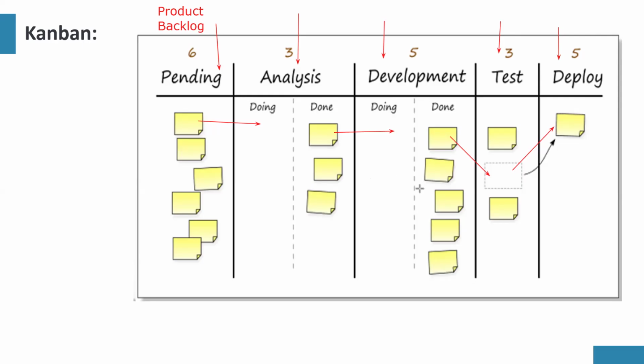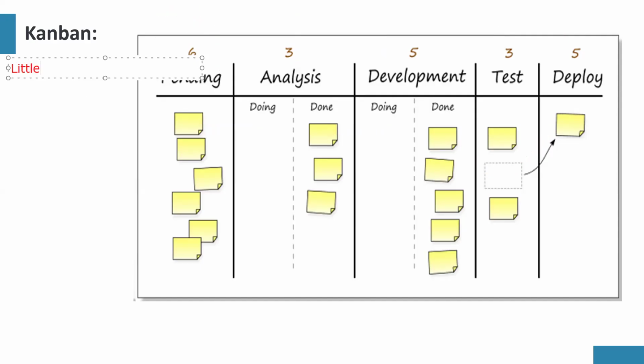One thing you need to know, which is important and very popular when it comes to Kanban questions, is what we call Little's Law. What is Little's Law? Little's Law is work in progress is equal to cycle time times throughput, right? So faster cycle time, faster throughput, shorter cycle time, reduced work in progress. Everything is in the Little's Law formula.